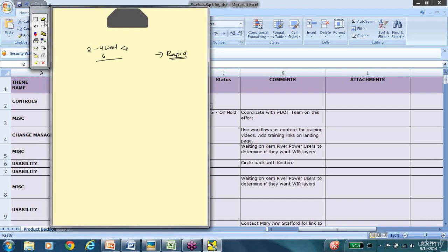Yes, so the product backlog has all the requirements before we begin it into sprints. You're correct. And also, in sprint 1, I would pick like 10 requirements. Sprint 2, I would pick the next 10. Sprint 3, I would pick the next 10. So what I'm doing here is my whole work is 100 requirements, but I'm breaking it down into iterations. So that is why Agile is a rapid model, it is an iterative model, and it is a lean model because you don't really focus on the documentation.